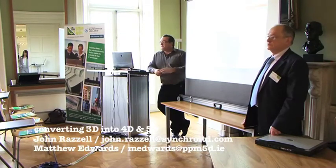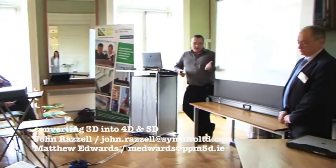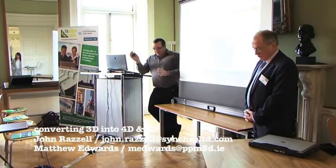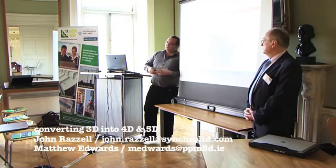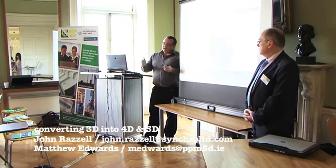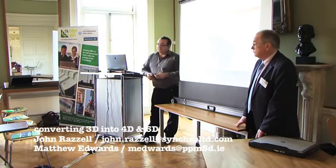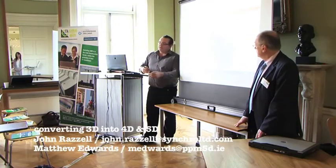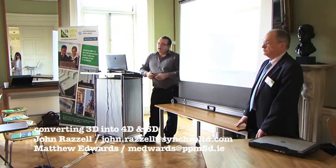But as regards to can you integrate it with the financial model? Yeah, you can do that. You see, the thing is, obviously there's a PQS. And I discussed this earlier with the gentleman at the back there, the problem at the moment is that with SMM7 and the way bills of quantities are done by PQSs, whenever they take, say for example, a substructure level on an RC frame building, they'll give it, say, 3,000 cubic concrete. Okay? Now, in BIM land, 4D as such, you have to break that down. So the financial model has to be a constructible model as such.